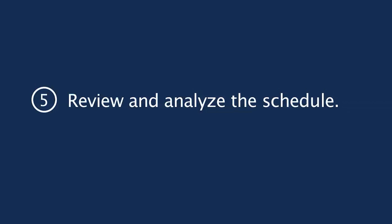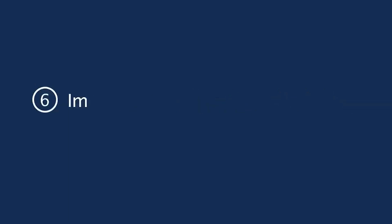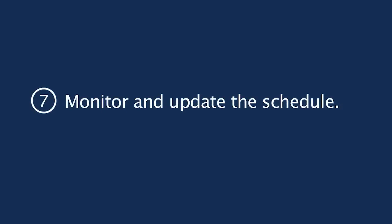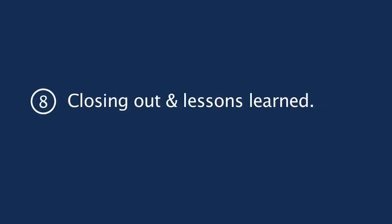After that you have a ready to implement schedule and then you go implement it in steps six and seven. Implementing the schedule, monitor and update the schedule, and when the project is completed then it's time to do the closing out.